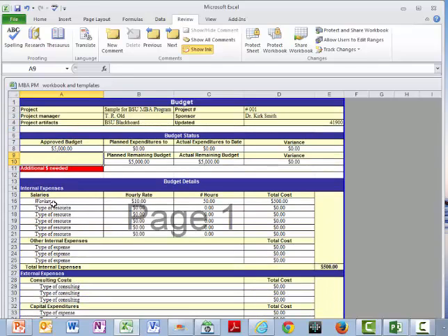So in this case, I'm just looking at a case of how you looked at workers. You on the project say, well, I don't charge anything. I'm free. Well, you're not really free. So we're going to ask you to come up with some sort of hourly rate for yourself. $10 is a nice number because it's easy to multiply and check. So in this case, the worker had 10 hours, or the hourly rate was 10, or 50 hours, and the higher mathematics we have is 500.